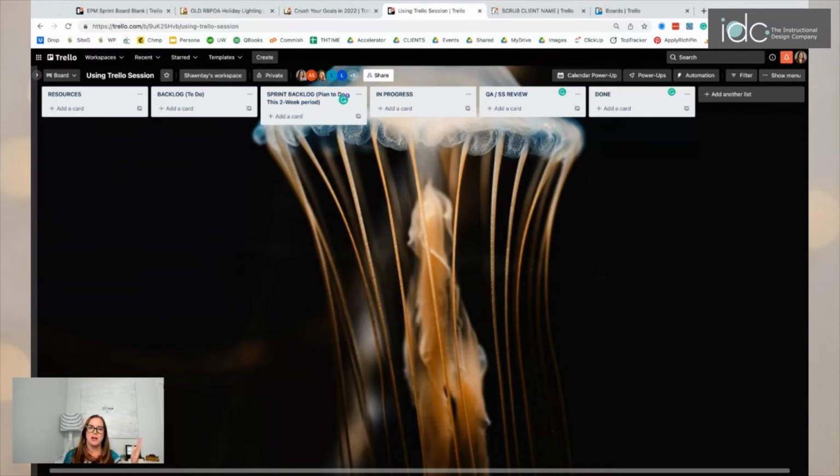And a time box usually starts on a Monday and ends on a Friday. So for this sprint, it would start on Monday, July 18th, this past Monday, and it would end next Friday, July 29th. And anything that I put into this sprint backlog, I am saying that I will finish in that time period.